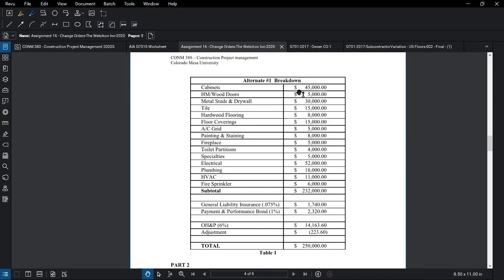But anyway, you could see every one of these items could potentially be a contract adjustment or a subcontractor change order for each of those subcontracts. So anytime you have a change order to the prime contract, the potential of having to create and issue multiple subcontractor change orders is fairly large. So you get the idea there.